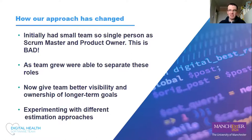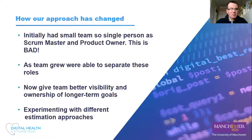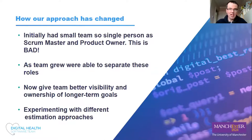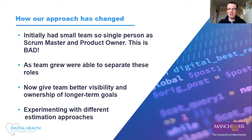We've also started experimenting with different estimation approaches. Historically we used technical story points — a relative measure of effort — and that's worked reasonably well. The downside is that near the end of a project, there are lots of little tasks, and you end up spending lots of time creating individual tickets to track them all. We're currently experimenting with just giving one or two developers a goal and saying: go to that goal, without worrying about having individual broken-down tickets for every small activity.